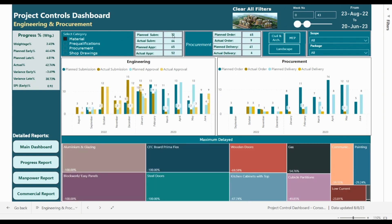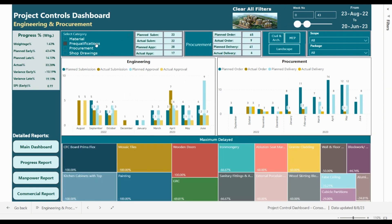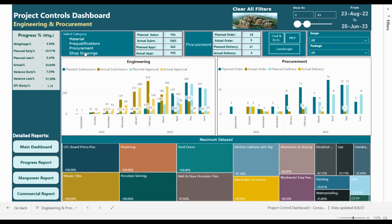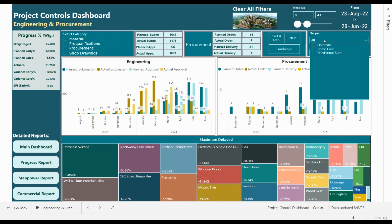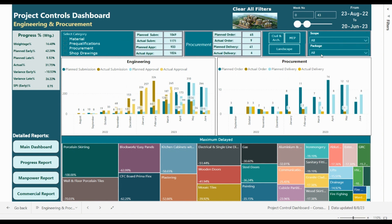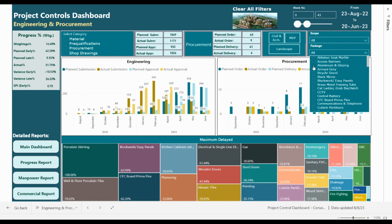This section presents statistics for planned submittals, actual submittals, planned approval, and actual approval, and statistics for procurement. We can filter pre-qualifications, shop drawings, etc. We can also filter based on package — civil and architecture, MEP, or landscape — and filter by scope of work: domestic, prime cost, or provisional sum.